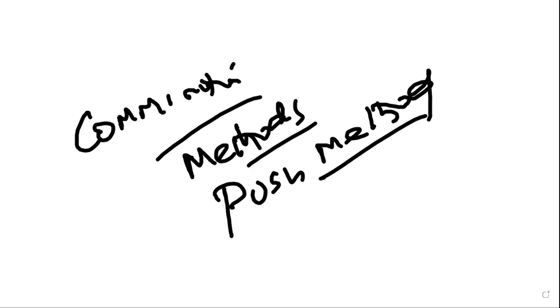If you're going to break a project and run it phase-wise, that project will be a predictive project. And mixing these two methodologies, adaptive and predictive, you get a hybrid. So some portion of the project you're going to run as phases, and some portion will be run as iterations.